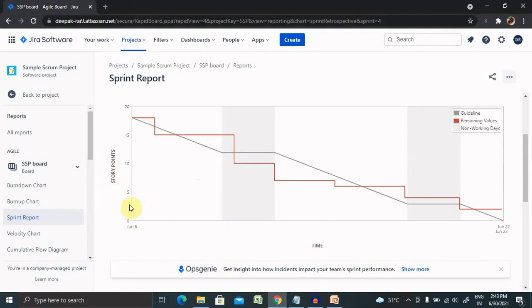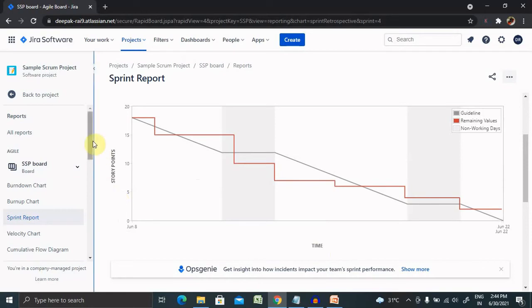The x-axis shows time and y-axis represents story points. The gray line is a guideline drawn from the total estimates of the issues at the start of the sprint. This is the gray line.